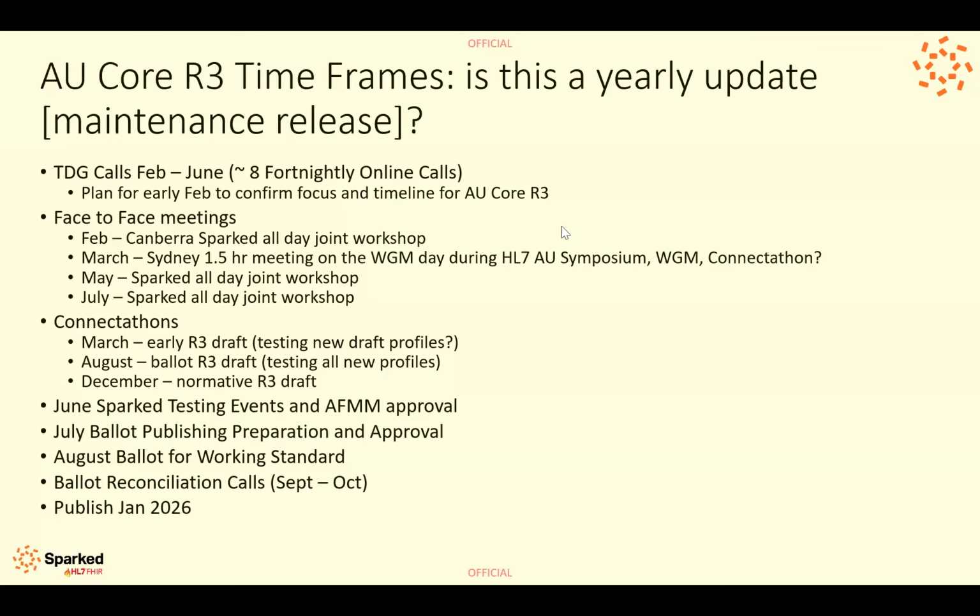Thanks, David. Heath? So I just wanted to confirm you're talking about a bigger release. So the bigger release would be a longer time frame than 1 year. Is that what you're alluding to? So the 1 year is the small increments, and a bigger or major release is some time greater than a year. Yes. I didn't put it on here, but we posed this last time. If we go for a major release, we would probably be looking at an 18-month time frame rather than a 12-month time frame, with those additional 6 months being used for development and further testing work.